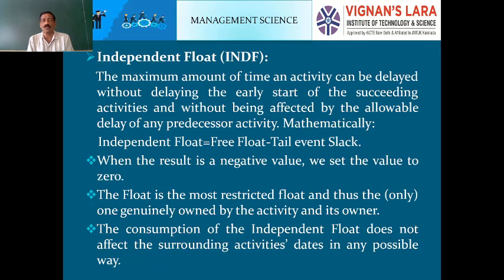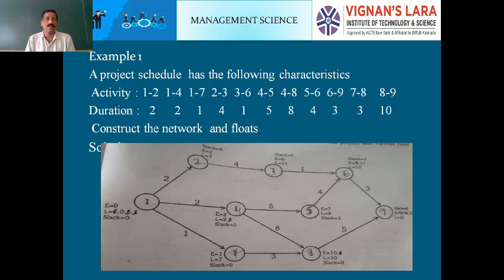The float is the most restricted float, and thus the one genuinely owned by the activity and its owner. The consumption of the independent float does not affect the surrounding activities. As I already said, the succeeding or surrounding activities should not be affected, either in dates or in any possible way. We will refer to one example, then we will get a better understanding.